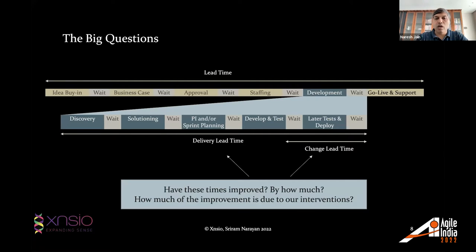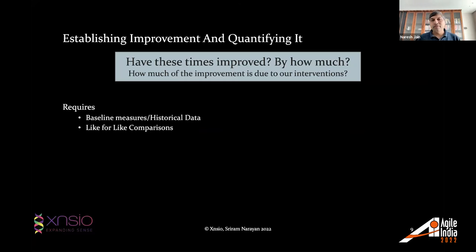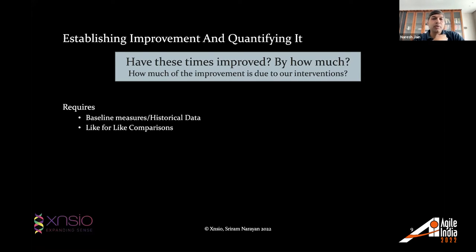The question we have is: have these times improved by our interventions? And if they have improved, can we quantify by how much? That's the kind of question we want to answer and be able to answer to the CXO, so they understand that the investment they're making in transformation actually gives a reasonable ROI. To answer this question, we have two prerequisites. First, we need to establish a baseline or some historical data against which we can compare and say whether things have improved, and by how much. Second, we need to do a like-for-like comparison.